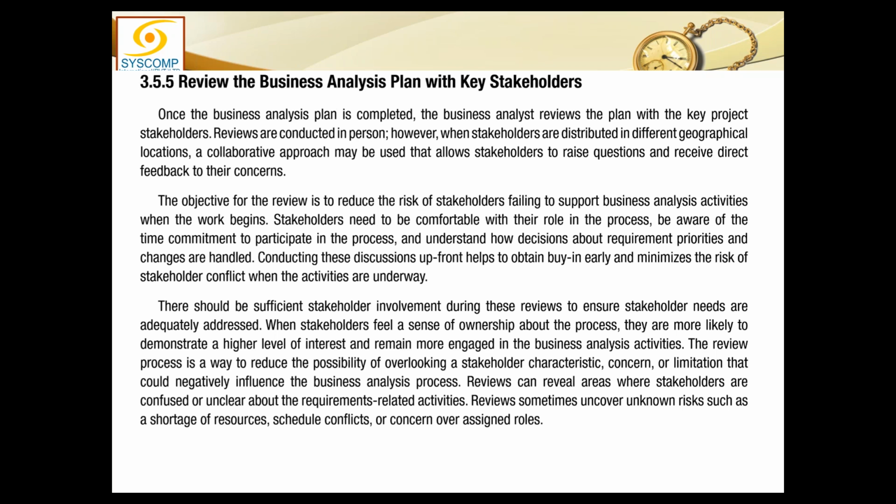The review process is a way to reduce the possibility of overlooking a stakeholder characteristic, concern, or limitation that could negatively influence the business analysis process. Reviews can reveal areas where stakeholders are confused or unclear about the requirements related activities. Reviews sometimes uncover unknown risks such as a shortage of resource, schedule conflict, or concern over assigned roles.